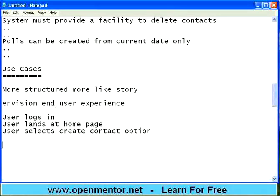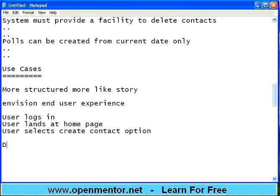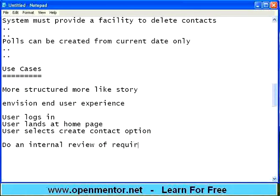People can write use cases also, because some customers tell requirements in that mode. Some customers will say 'I need this, I need that.' Either way, the business analyst can write requirements — usually in a document or in a spreadsheet. Once this is done, do an internal review of requirements. This is called a peer review — other people will read through your document and point out the mistakes.